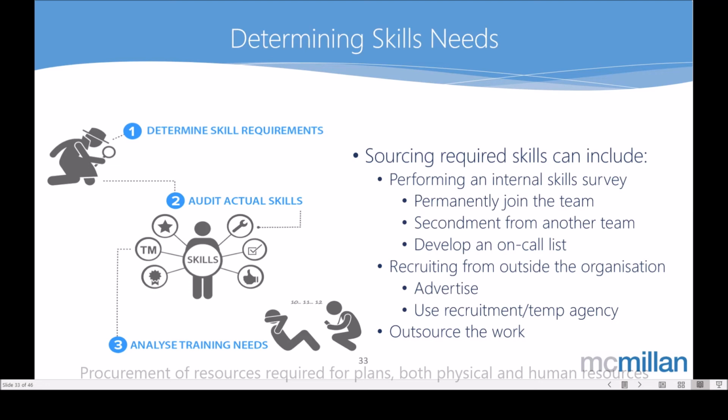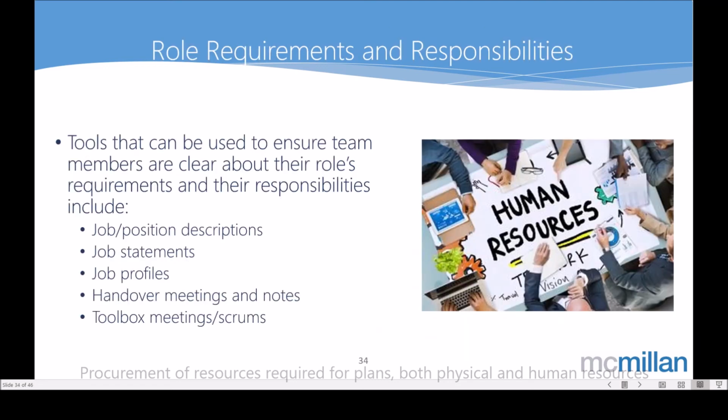Is there some type of temporary employment arrangement that we can get someone to come in with those skill sets? So something like a recruitment agency or a temporary agency. Or do we have to just recruit for that and go to market and get someone in who can do that, whether that be for the timing of our endeavor. So if it's a 6-month plan, that we get them in for the 6 months, or whether we recruit them permanent because there's going to be ongoing work for them.